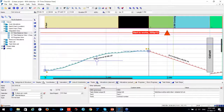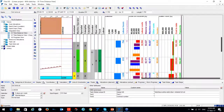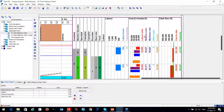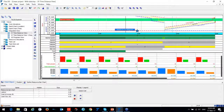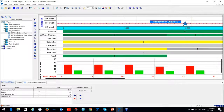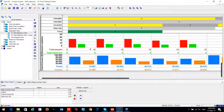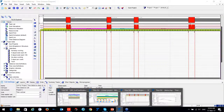This is a powerful tool for calculating the real duration of an activity — here it will take 24 days. The preloaded resources on activities show labor information, total machine hours, cost, income, and a cash flow diagram on the time axis. The same information is also available according to distance — showing machine operators, specialists, number of resources in histograms at 500-meter intervals, total people working, total machines working, cost and income by distance.